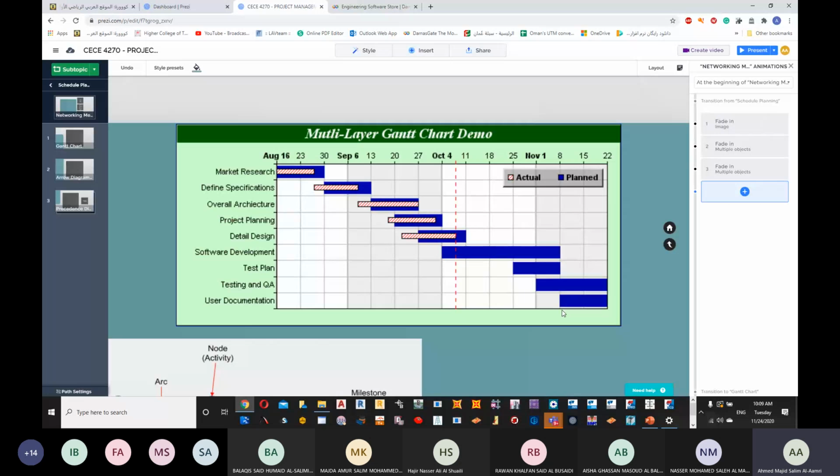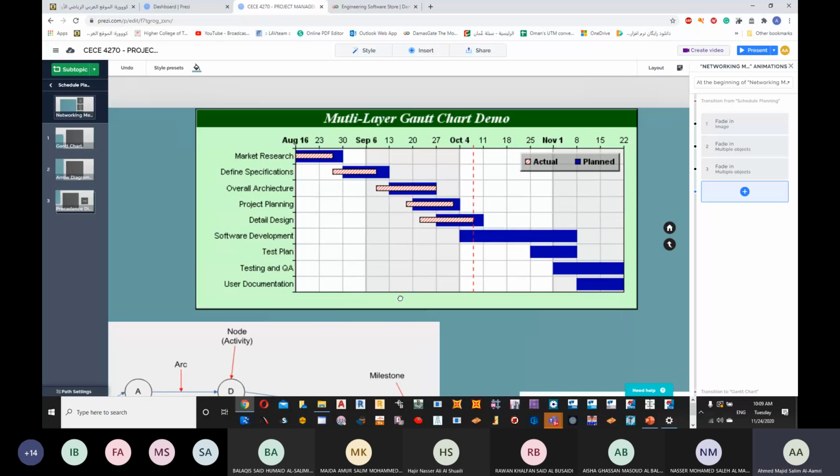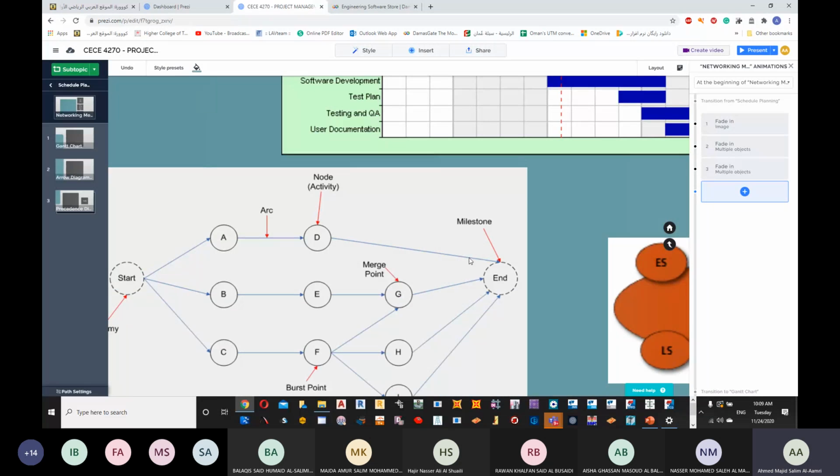One, the arrows or the relationships are not clearly stated compared to an ADM. If you see in the ADM, we have used arcs or arrows to represent the relationships between the tasks. It's very clear that we have a relationship between A and D, but we don't have a relationship between B and D, okay? Since the arrow or arc is shown.